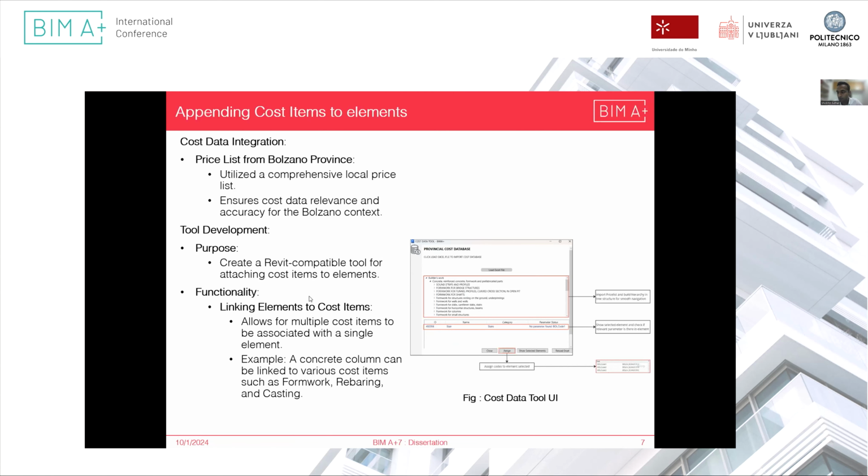This tool can help to append multiple cost codes to a single element. The previous approach before this tool was using the Autodesk interoperability tool, but due to the limitation that only one single cost code can be assigned, we needed to develop this plugin for Revit.